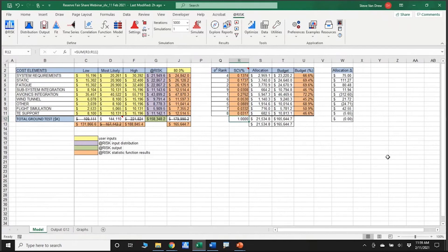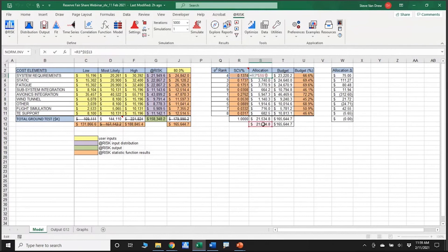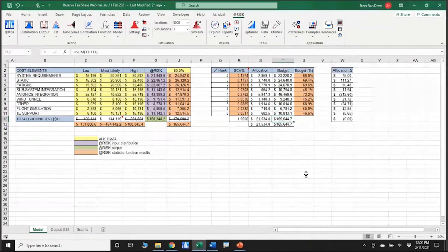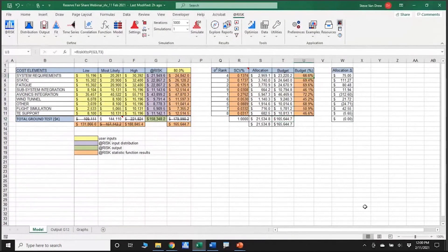As a check, all nine values sum to one. I've taken those proportions and multiplied them by the amount in contingency reserve, giving a dollar allocation amount for each. Adding those to the most likely sum gives the allocated totals — and this approach also sums to 165.6 million. Over here I've done the budget percentage again. It's hidden right now, but your obvious question is going to be how similar these two approaches are.